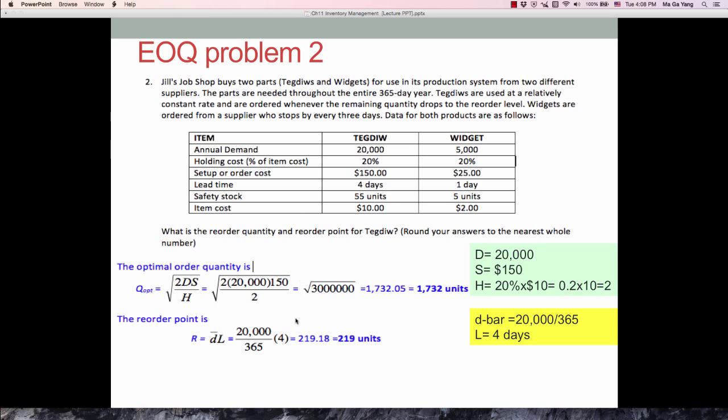So based on these two, EOQ and reorder point, we can set up our inventory policy, which is: when the inventory position drops to 219 units, we place order for 1,732 units more.